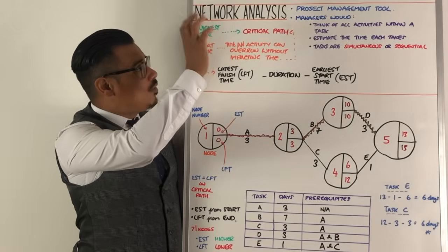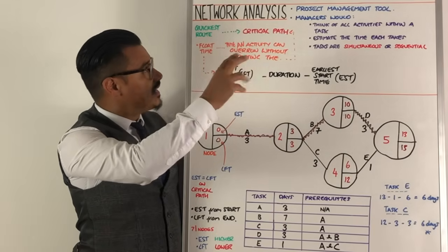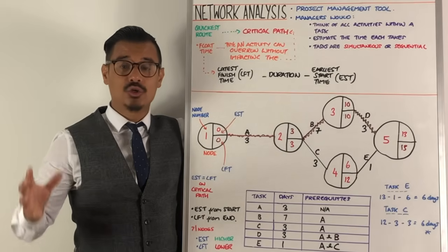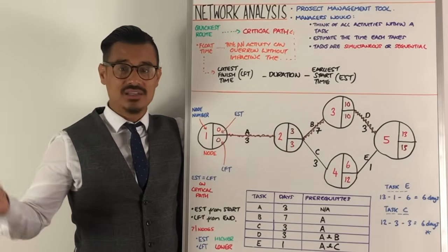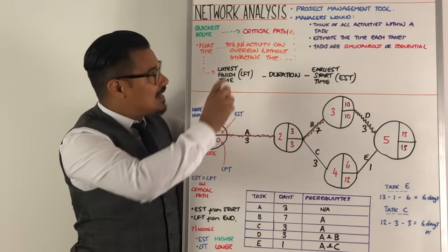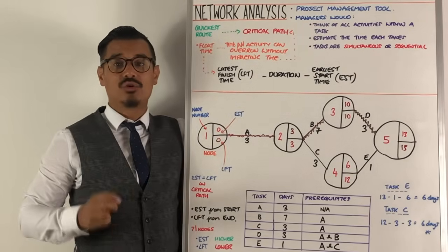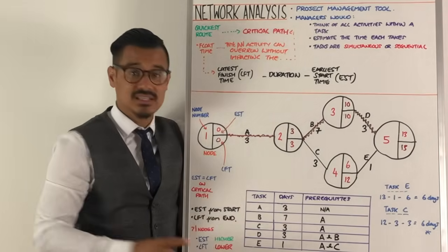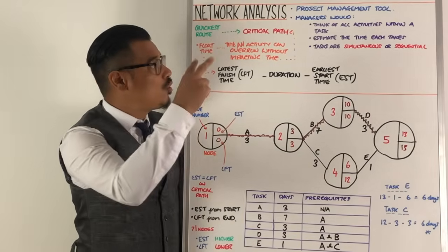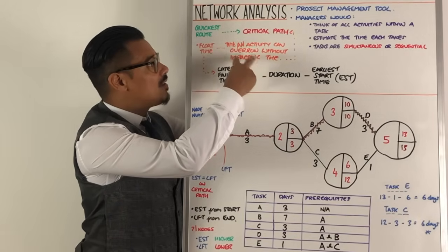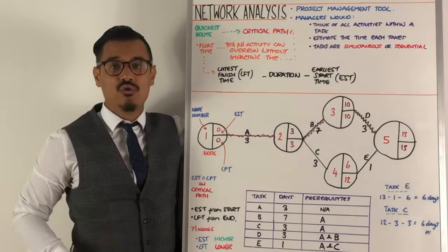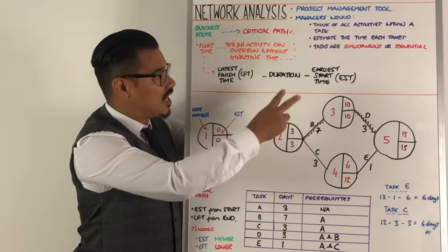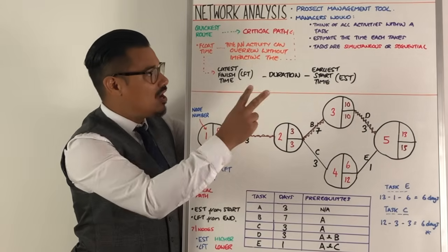The idea with network analysis is once your managers have got all of that data, they're trying to work out the quickest route to complete the project. And that is what's called the critical path, why it's sometimes called critical path analysis. Other important things to know related closely to critical path is that some tasks will have what's called a float time. And that is essentially the time an activity, one of those tasks, can overrun without impacting that critical path, without impacting the quickest route. And there is a formula for float time. The formula is the latest finish time, sometimes called the LFT, minus the duration of the task or the activity, minus the EST, the earliest start time.